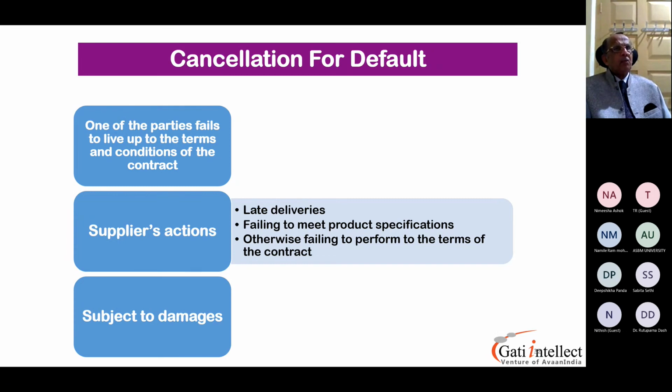Please understand, all of you, I want on completion of this course, when you get back to your organizations, to use the right terminology in all your communications. You have to classify these as breaches of contract. Got it? Then you have to give them in writing warning letters. Warning letter number 1, warning letter number 2. Failing to meet product specifications.